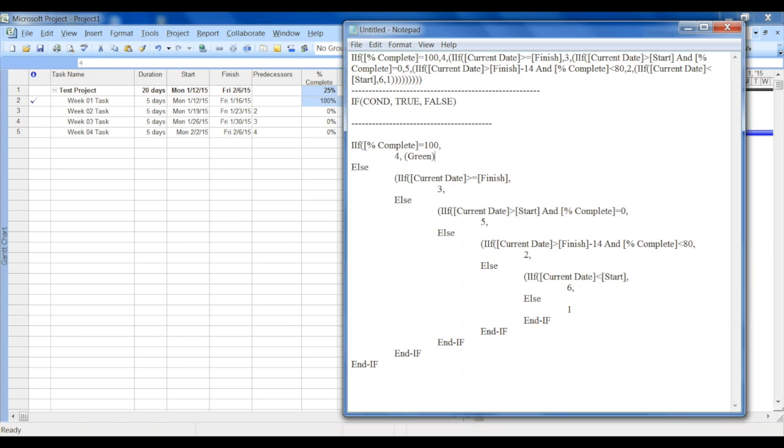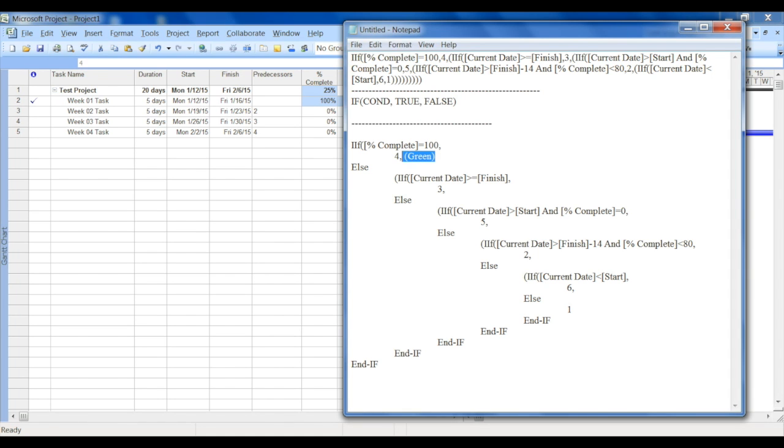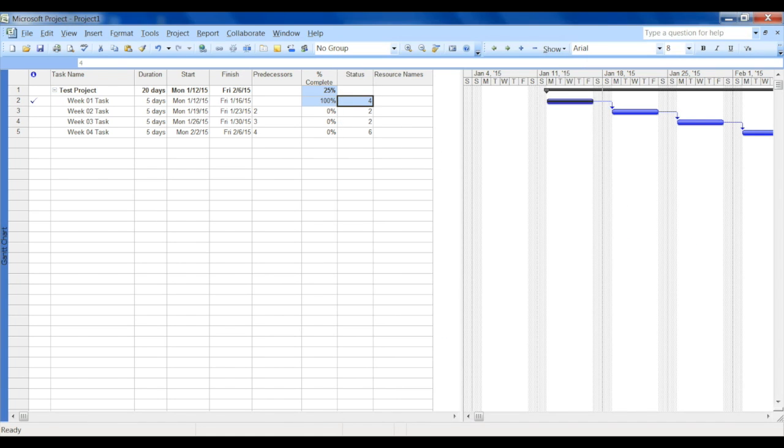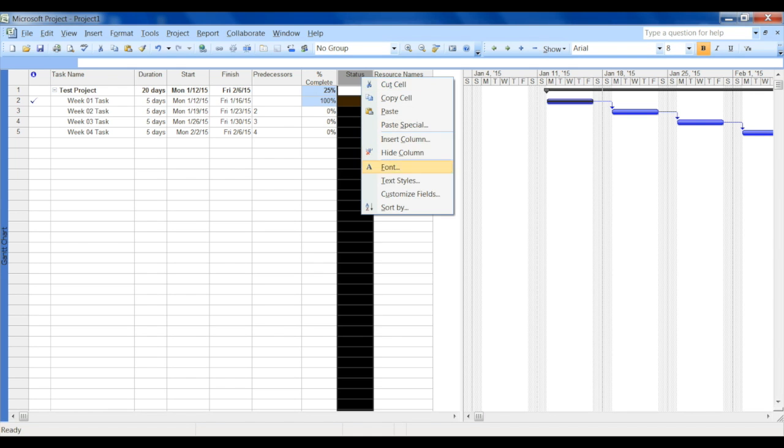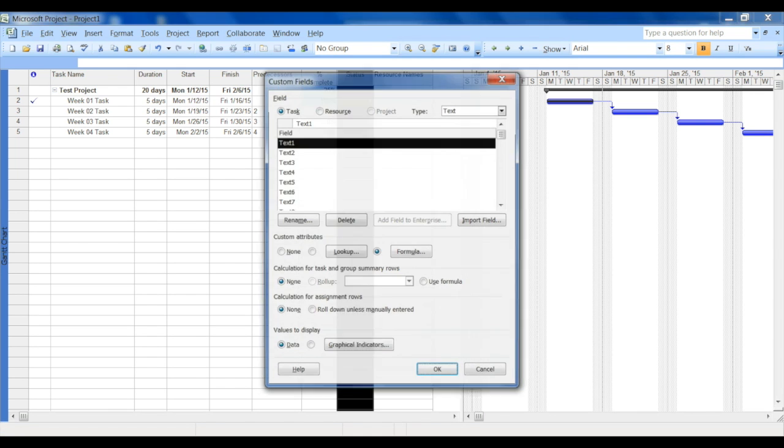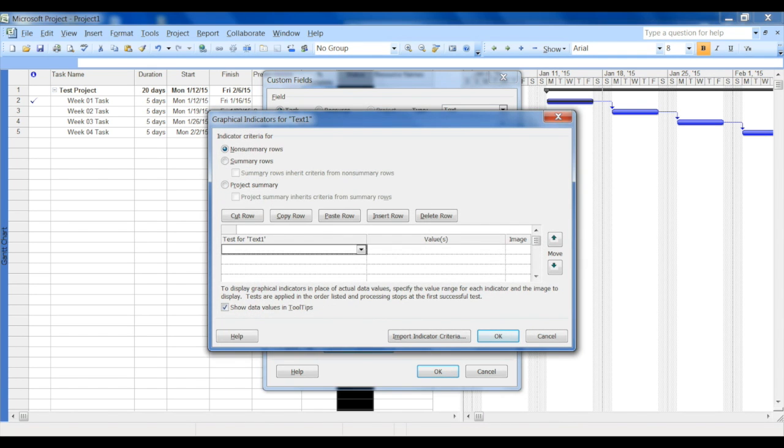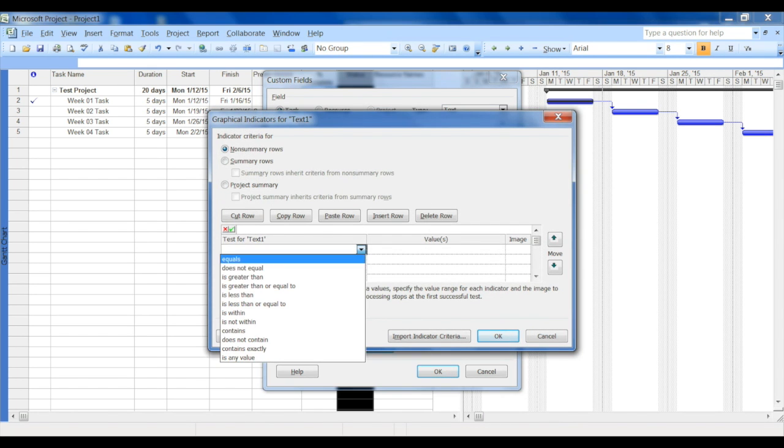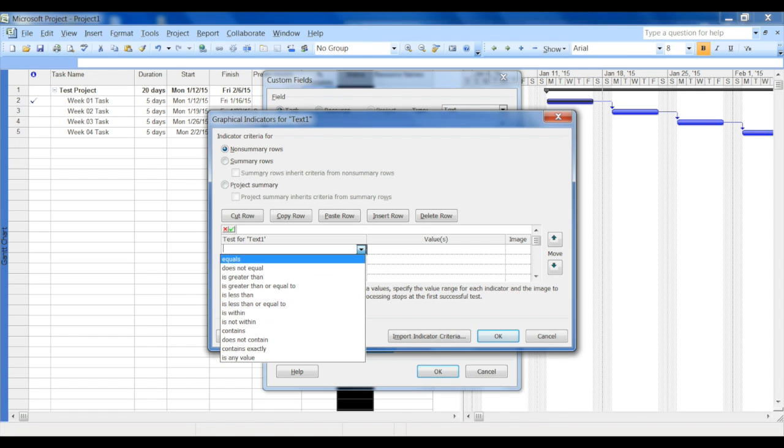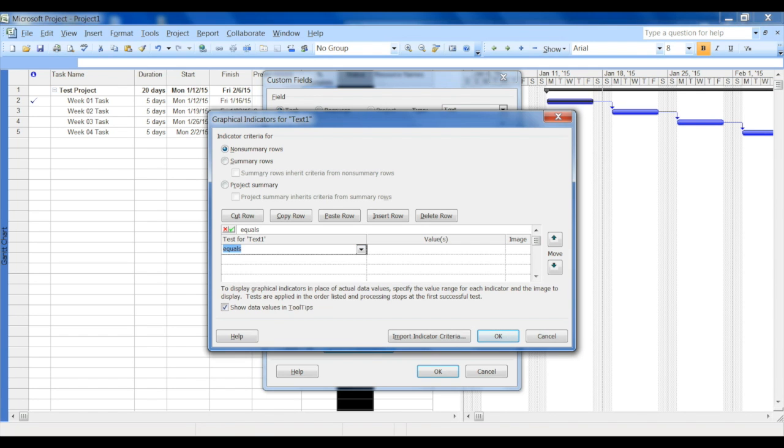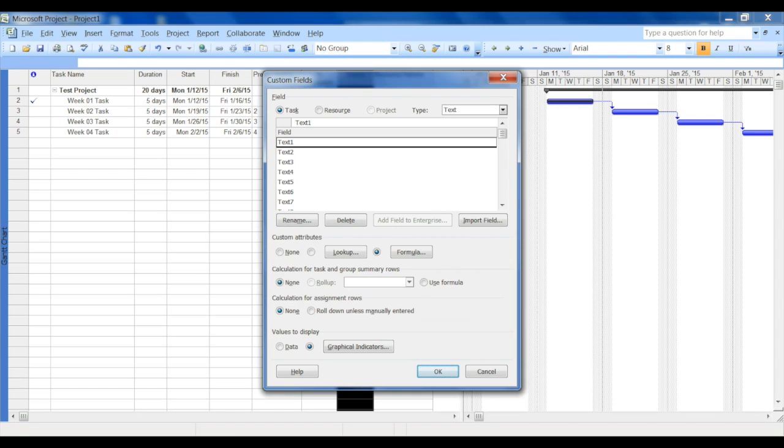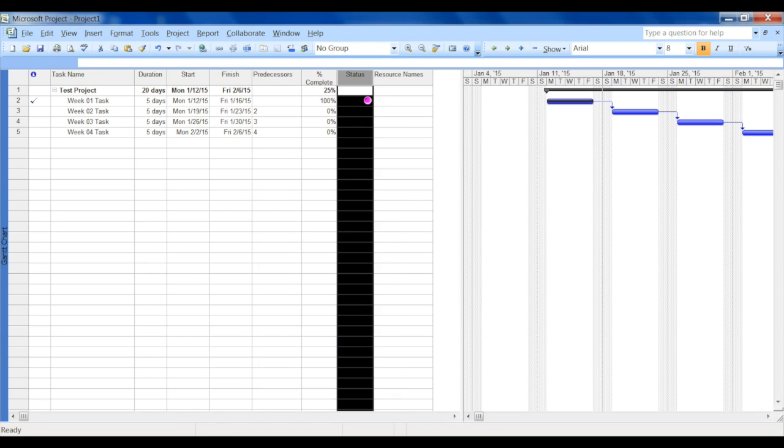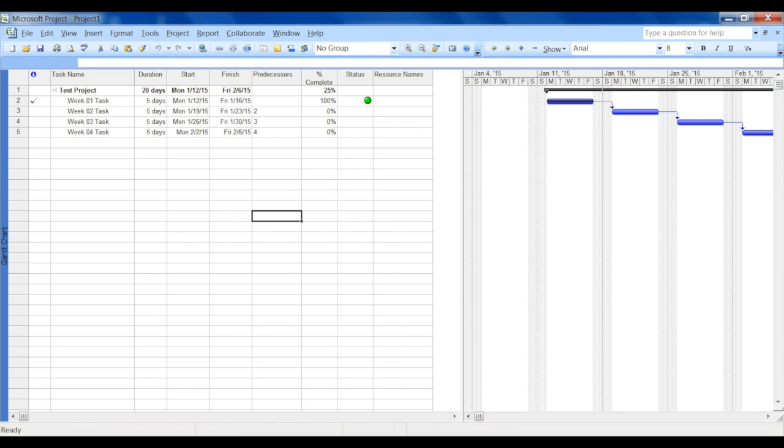So if we achieve that scenario where it is 100% complete, it displays number four. That's nothing but coming from the formula. Now how do we make it green? You want to go back to the status column, right-click and say Customize Field. You'll notice that currently the values are displayed as data. You want to change that to Graphical Indicators. We are testing equals and the value for 100% complete is four, and we want to mark that with a green.